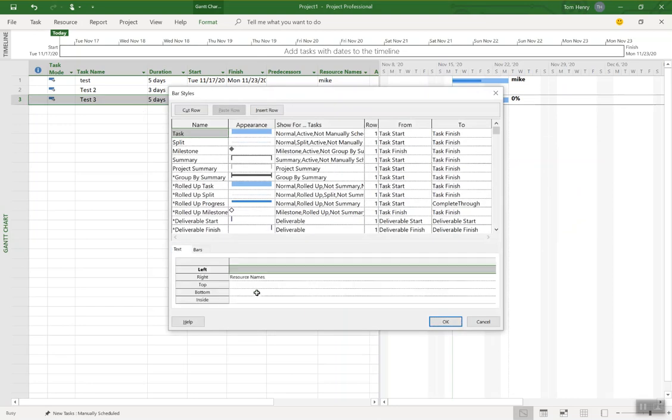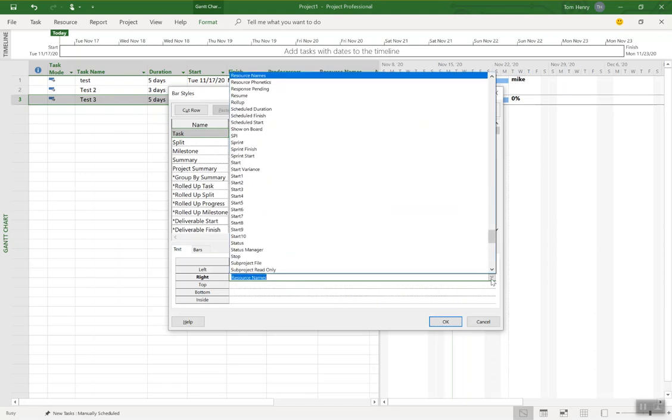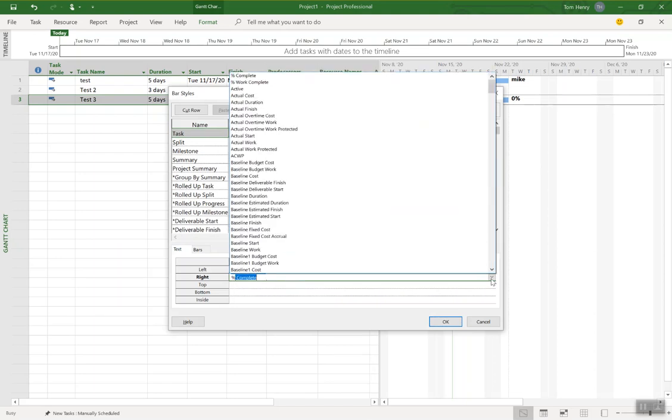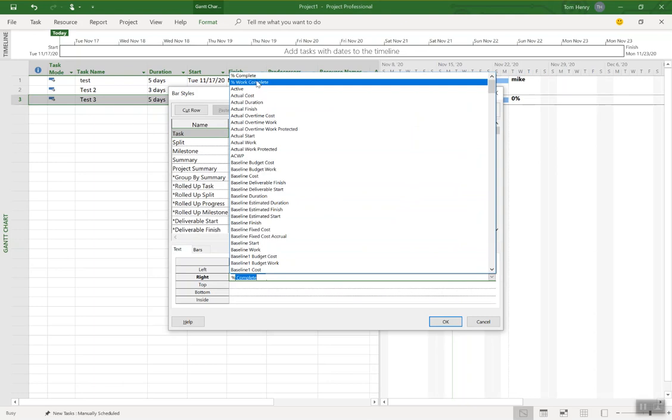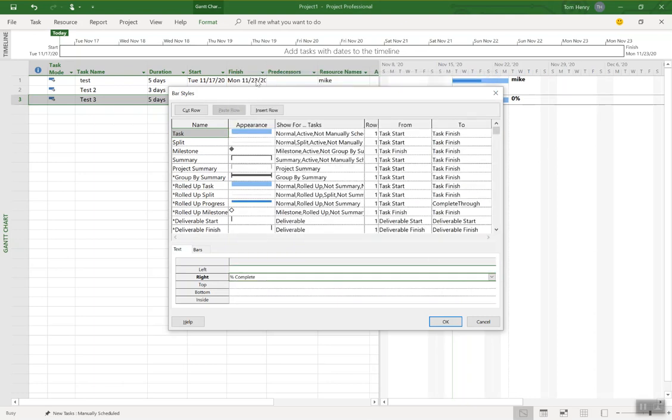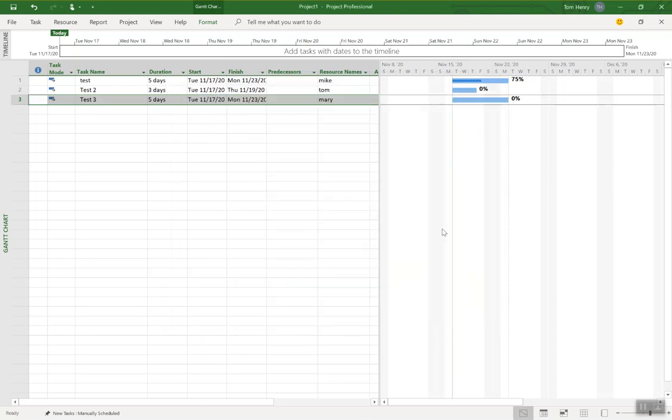It's kind of a little bit hidden. There you go. You can see resource names. I can change that to percent complete. I can change it to percent work complete as well if I wanted. Percent complete, of course, is the percent duration complete. That's a whole other subject there. But there you go. You can now see the percent complete and my test task. 75% complete is now shown up.